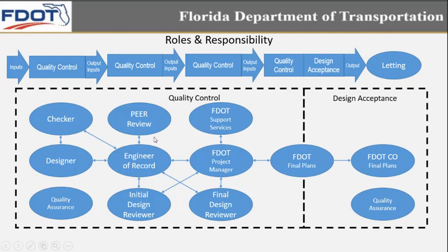You see also above engineer of record, you have on some projects what's called a peer review. A peer review is essentially a repeat of this whole triangle taking place again, signed and sealed by another engineer.